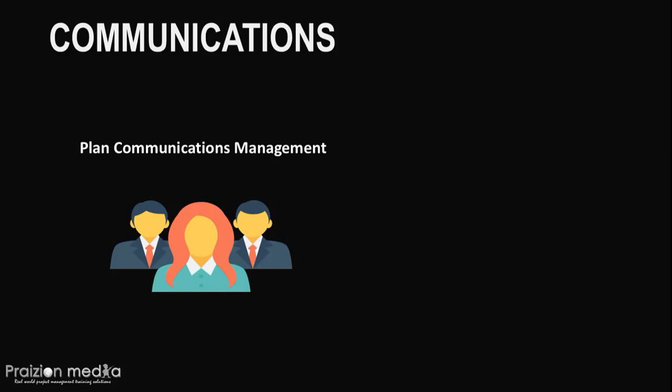Now, when we talk about communications, we talk about the models. Communication models, sender-receiver models, and all of this stuff is important for your exam. One of the questions that you typically should expect is the number of channels of communicating. How many channels of communication will there be if everyone is left to communicate with everyone else? The formula is n times n minus 1 divided by 2.